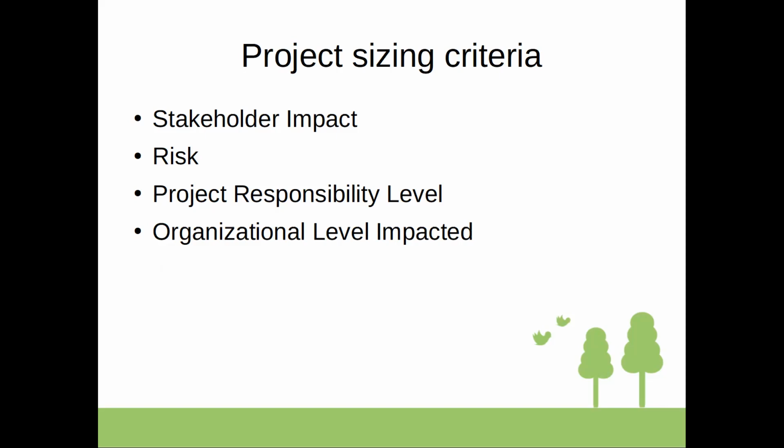As I mentioned, there can be also hybrid approach where you have waterfall project, but within this waterfall project, you have agile stages, let's say, like you reach certain milestone and you go to an agile format to implement certain software, let's say, or certain change. So yeah, it's definitely possible, and I'll stop on this.